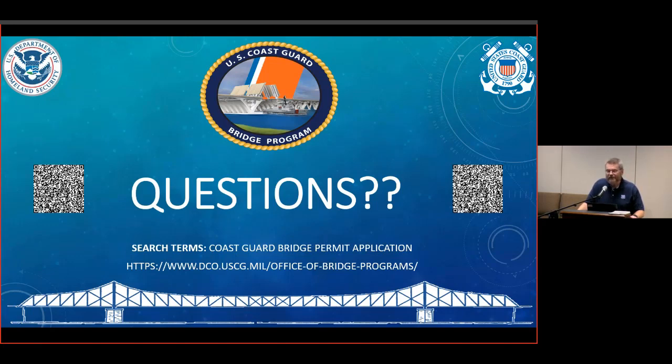My default answer is always going to be that the Coast Guard bridge permit will be the last permit. We want to have every other permit lined up before we issue ours. So that's my answer, and I'm sticking to it. And if you want to have a couple beers later, we can talk about weird stuff that I've seen in the program.